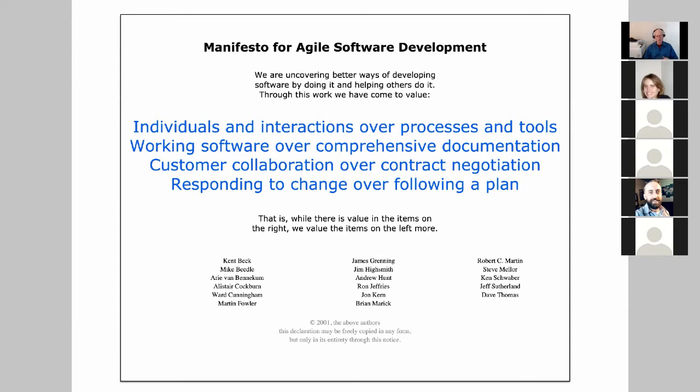Other types of new product development, especially in the early design phase, these more agile approaches could be beneficial there. But as soon as you start cutting metal and ordering long lead items and paying for production grade tooling and fixtures and so forth, the cost of change goes way up, and you're going to become much less interested in hearing about new changes once you've gotten to that point. So I like to say Agile has its place, but it also needs to be kept in its place.